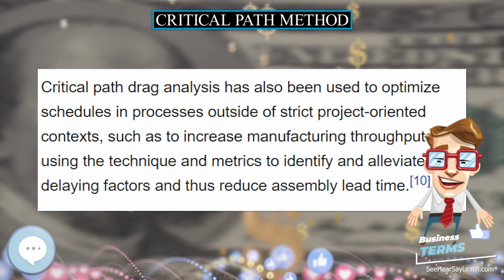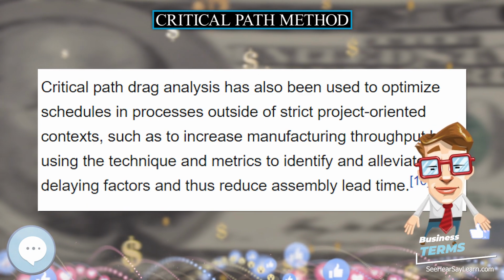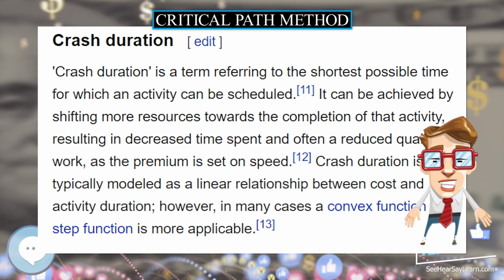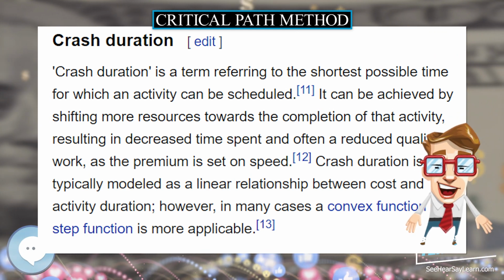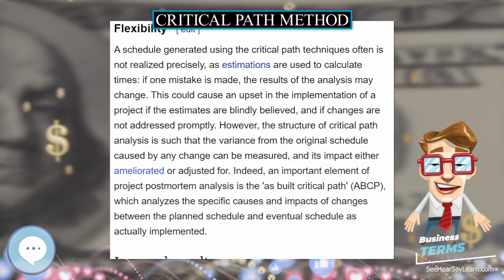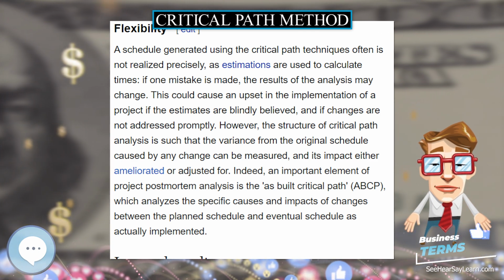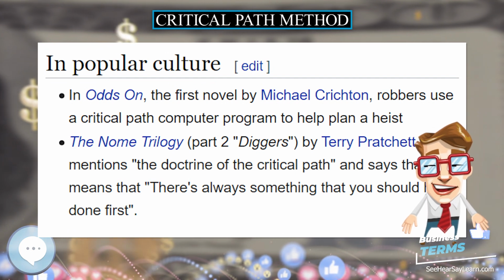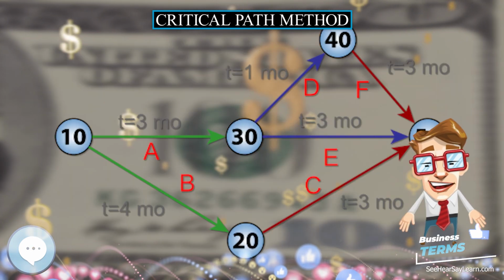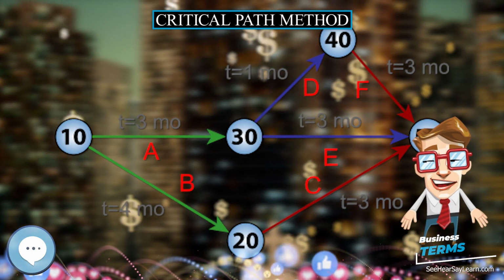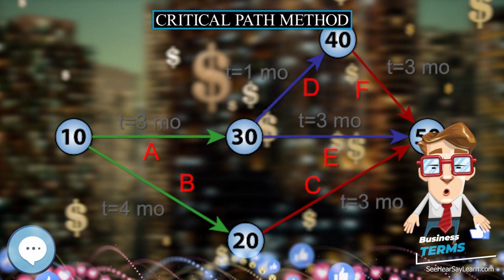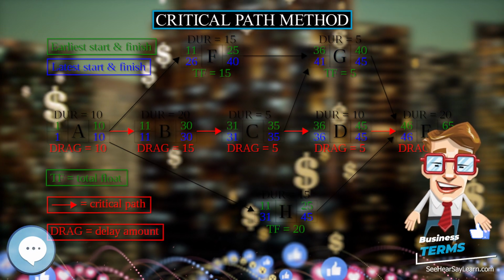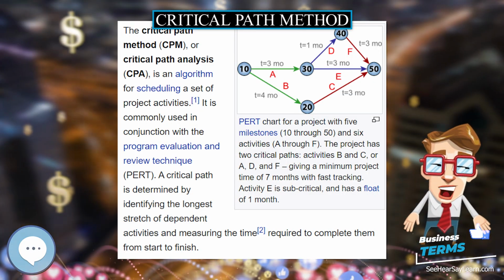For example, if a project is testing a solar panel and task B requires sunrise, there could be a scheduling constraint on the testing activity so that it would not start until the scheduled time for sunrise. This might insert dead time, total float, into the schedule on the activities on that path prior to the sunrise due to needing to wait for this event. This path, with the constraint generated total float, would actually make the path longer, with total float being part of the shortest possible duration for the overall project.